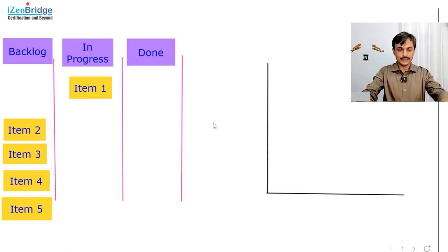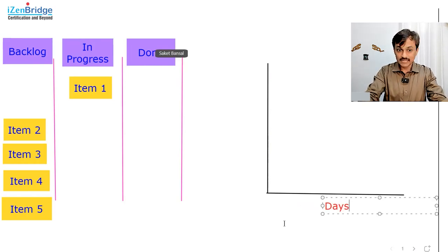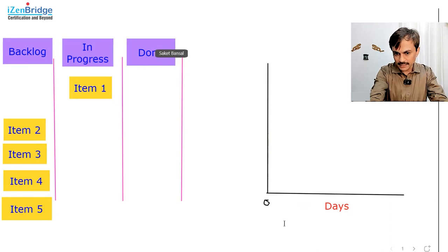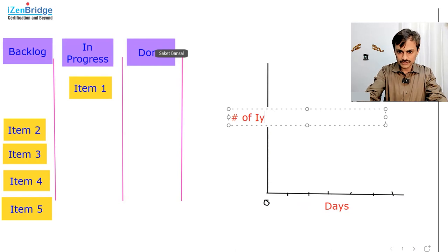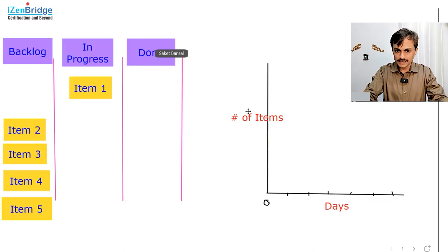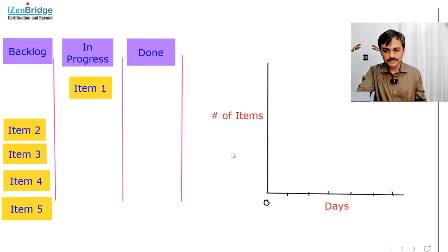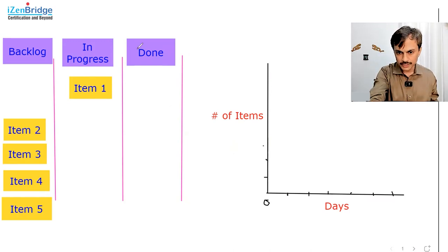Now how do we depict this in a cumulative flow diagram, just at day zero and day one? In a cumulative flow diagram, the x-axis represents days — a timeline starting from zero through day one, day two, day three. The y-axis is the number of work items on your board. It's an area graph that helps us know where we are for a particular area of work. As of now I have five items total, so five is the top number on the y-axis — one, two, three, four, five.